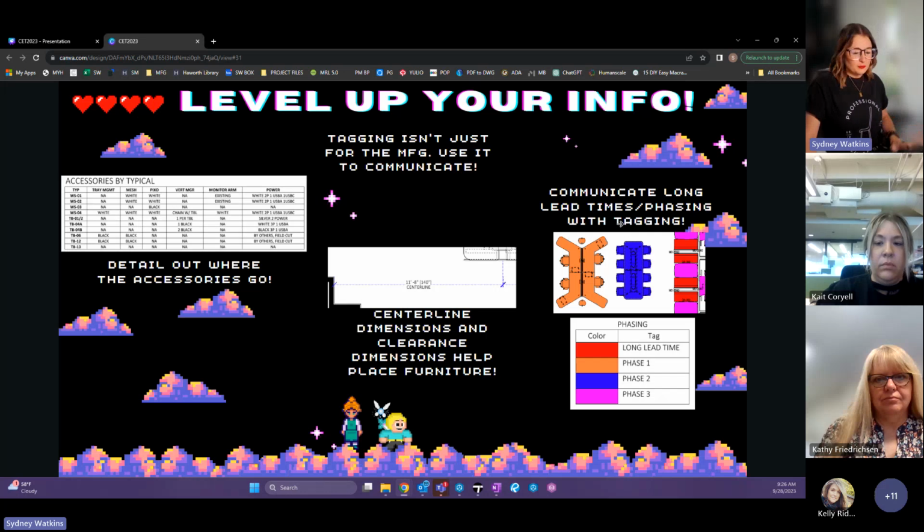So we're going to level up our info. Project managers have to deal with a lot, and a lot of the time we don't bring them in on the project early enough for them to know what's really going on. So they end up on site with a bunch of product, maybe not even tagged, and don't know where it's going. And they're calling you constantly, asking a million questions. You can solve all of that, first of all, with a pre-install meeting, which I think is mandatory. But if you provide all this information on the drawing package, very clear and concise, they're not going to be asking you as many questions.